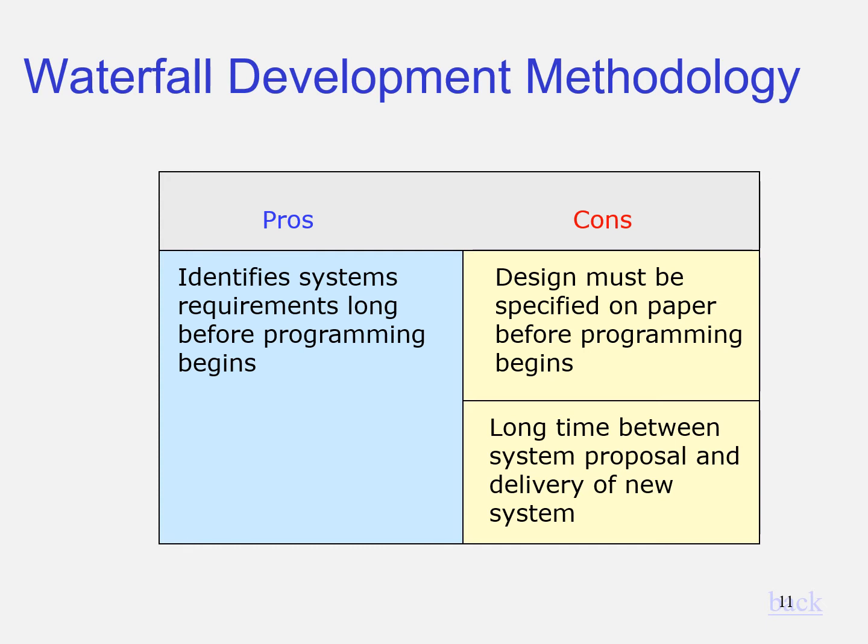And back then they were using paper, and there was a long time between system proposal and delivery of the system, meaning that from the first time you meet the user until he or she sees how the system looks will take quite some time. Why does that happen? Because that process is done one by one, and the user is only involved during planning and after the system is ready.